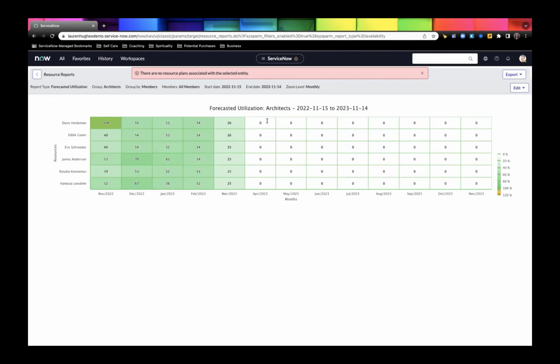I'm looking at that. Yeah, if you allocated them based on a group level, it should basically have that group and then have those allocations across the members of the group. But if the other members of the group didn't have hours available, it may have only allocated hours to a couple of members in that group, and that might be why you're just seeing a few individuals there.